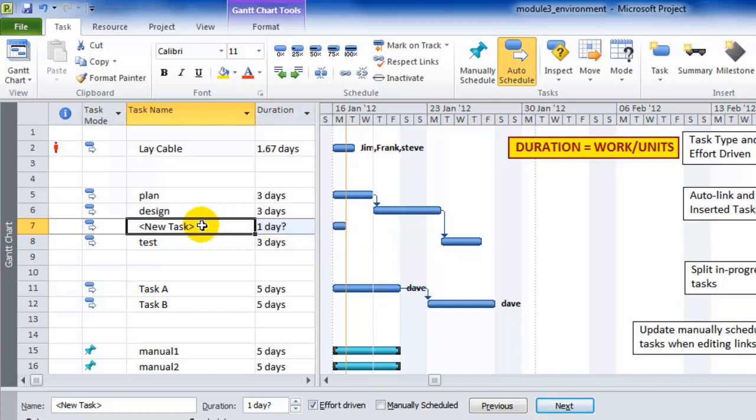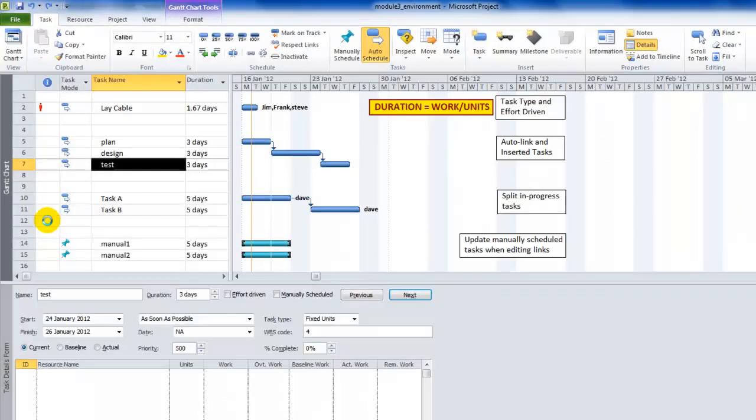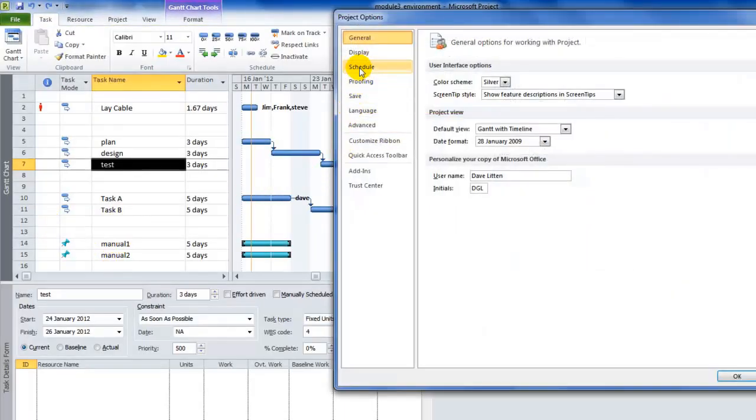You see, if you insert a new task at a certain point vertically in your task list, who says it has to be linked from this to this to this? You might want this to be linked from here, and from here to go somewhere else. So sitting it back like a little orphan at the beginning is the best default setting, in my opinion. Let me just take this out. I'll just undo and show you this again, but this time with auto link selected.